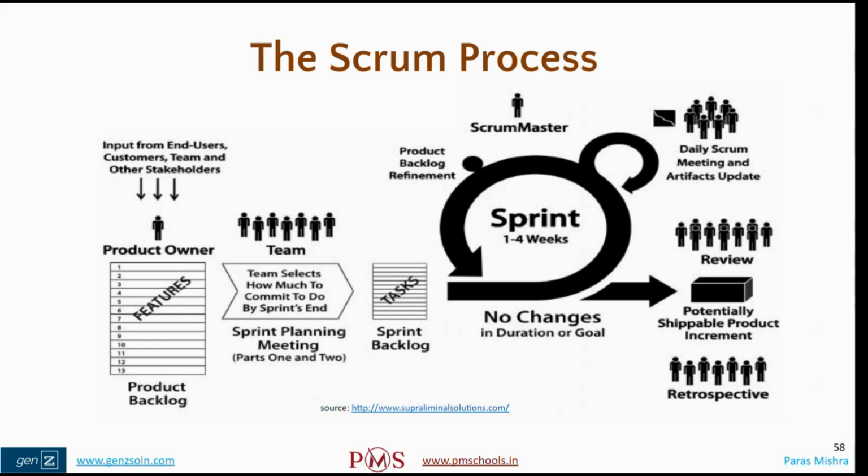And then the retrospective. What will happen in the retrospective? We realize what went well. We decided with 10 laborers, but 3 laborers did not come because they fell sick. And this is a rainy season. We also did not anticipate the rain. So 3 days were actually lost, and that's why we could not complete our work. The full foundation was not completed. The foundation for the last wall is still remaining.